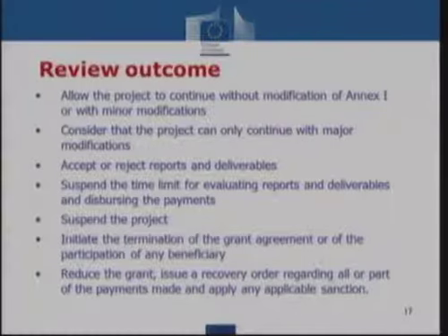And it looks like you really need to make major changes in order to continue the work. Then it would be better to suspend the project and try to find out how you will fix the issues. Maybe you need to replace beneficiaries. Maybe you need major modifications to the description of work, and it wouldn't make sense to further continue the work, but just interrupt it for a period. It can be 3, 6, 9 months. It could also be that in the review meeting the conclusion is that this project is not really performing very well. We really need to adjust it, and it cannot continue as such. So we need to suspend in order to make the necessary changes.